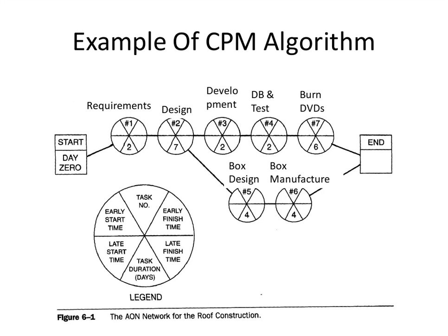What's the earliest it could start? 9, finish 11, next start 11, 13, pretty good. Yeah, and the next one? 13, yeah, and 19, good. Great. Okay. Now let's go down to complete this first pass, this forward pass. Let's go down to this next one.